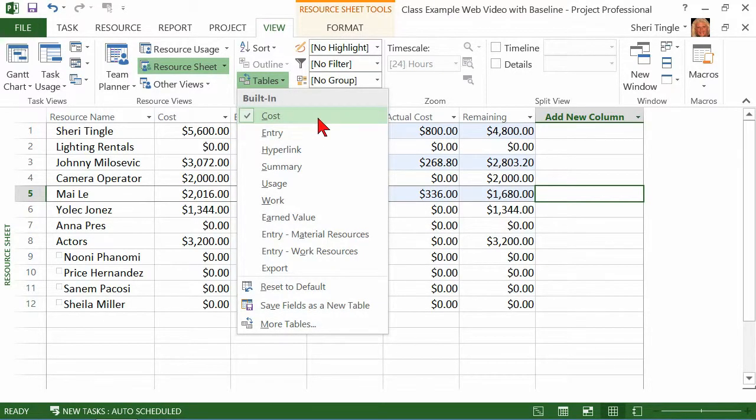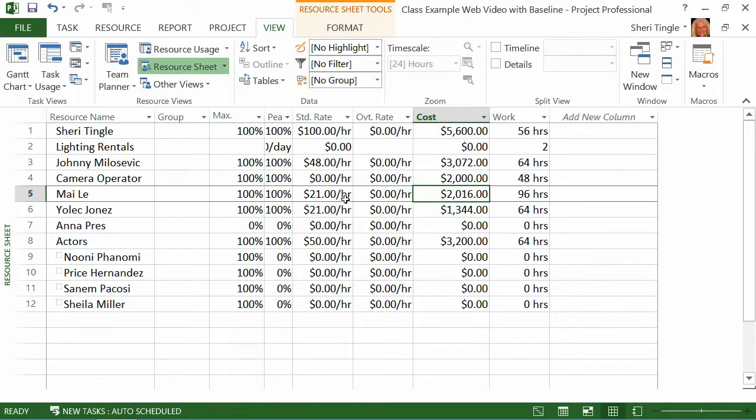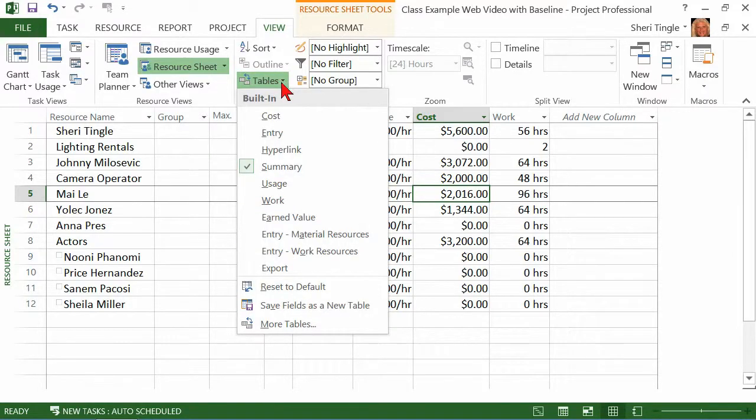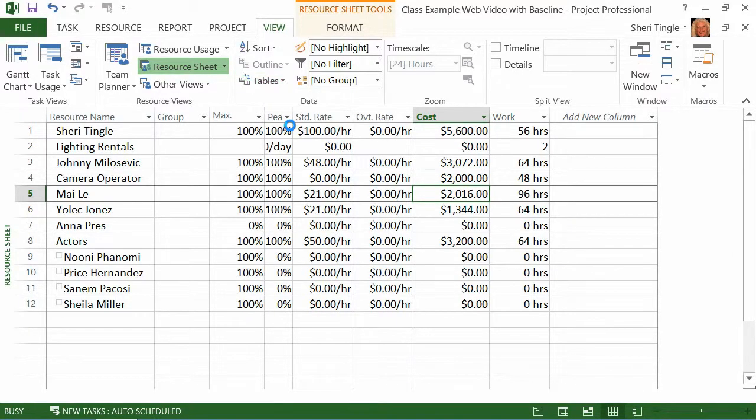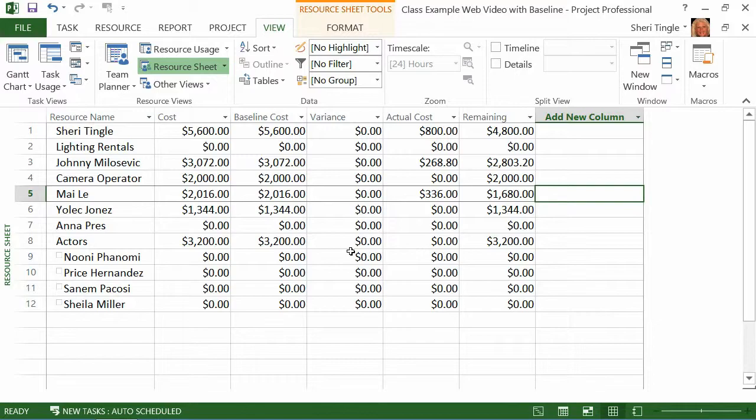Tables cost. That's how you do that. You simply say, whichever view you are in, whether it's tracking Gantt, the Gantt chart, the resource sheet, any view that you are in that holds a table, work your way down the view ribbon down to the data section and see what kind of tables you have. Now, you're definitely going to want to check some of these others out because there's some other great tables that are here and available as well. But mostly for resources, I think you'll use the cost and the entry because they are just so fantastic. So now when you want to see a little bit more detail about what your project is costing, try changing the tables and then don't forget about your project summary.